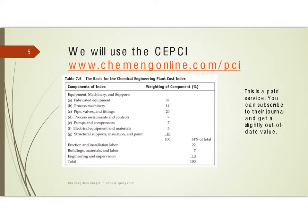For my course, we use the CEPCI. You can get this from Chemical Engineering Online, but unfortunately it's a paid service. However, you can subscribe to the journal and get a slightly out-of-date value — it's two months delayed — and for the purposes of class, that's more than adequate.